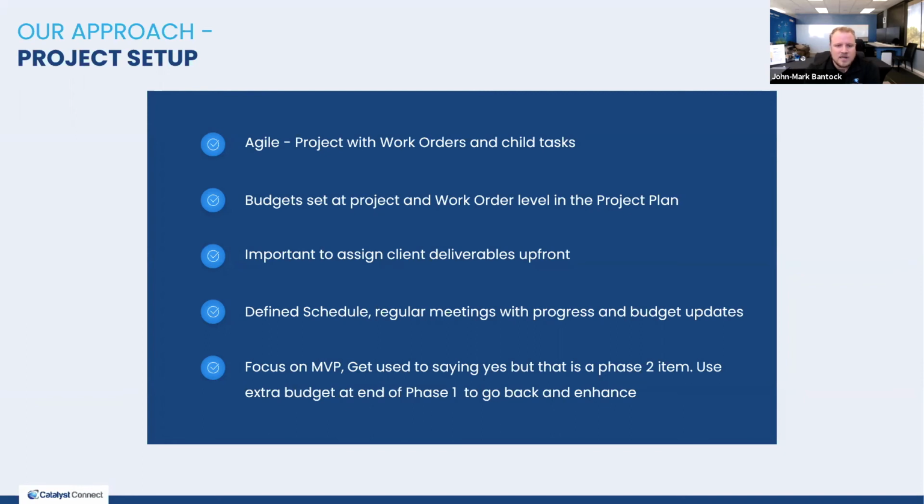So we tell clients an estimated hours upfront of, well, you've given us this business scenario. This is how we're going to solve it with XYZ Zoho apps. These are the features that you're going to use, and it's going to take approximately 8 to 12 hours to do this piece. Here are the pieces that we know are rock solid. You've given us our field list. We know what the drop-down pick list values are and how to set up our layout rules, but we don't know what we don't know.